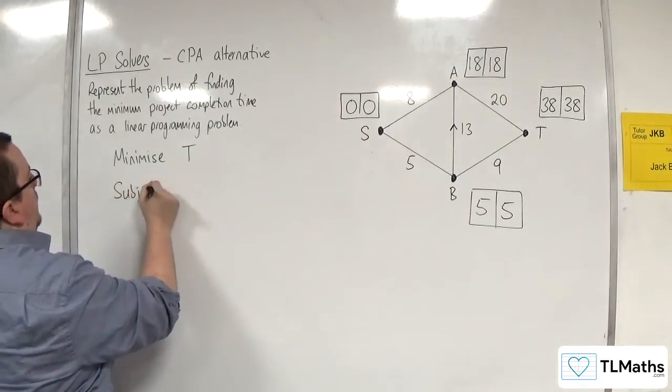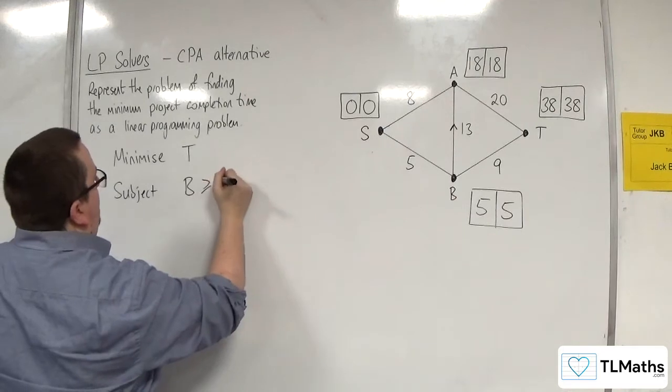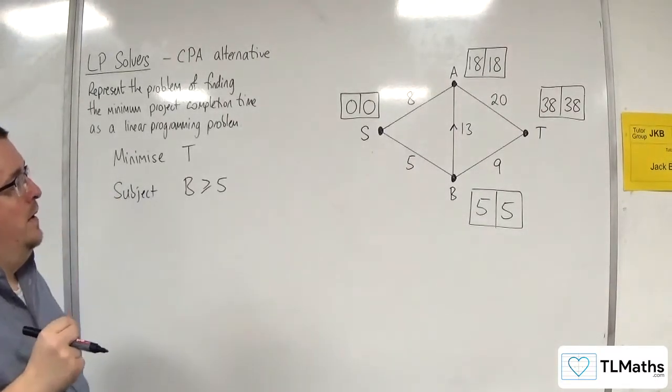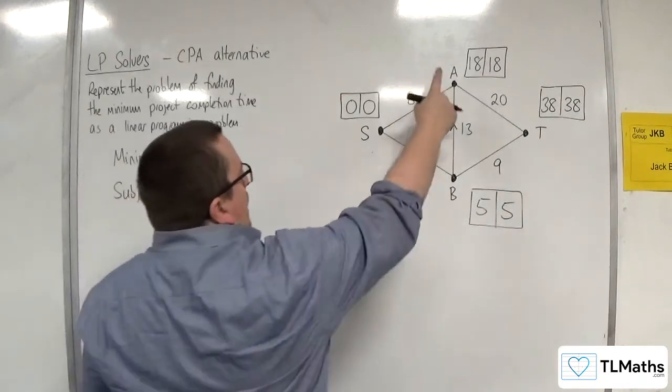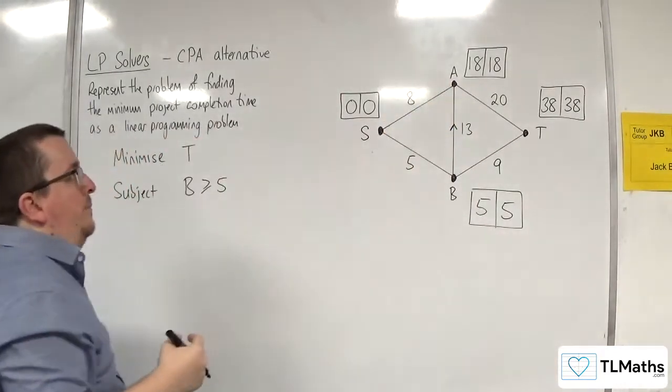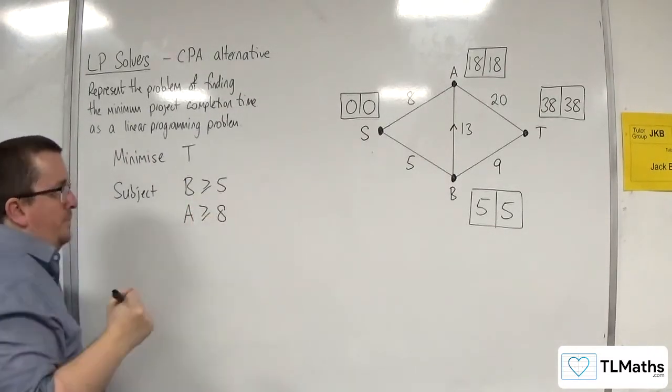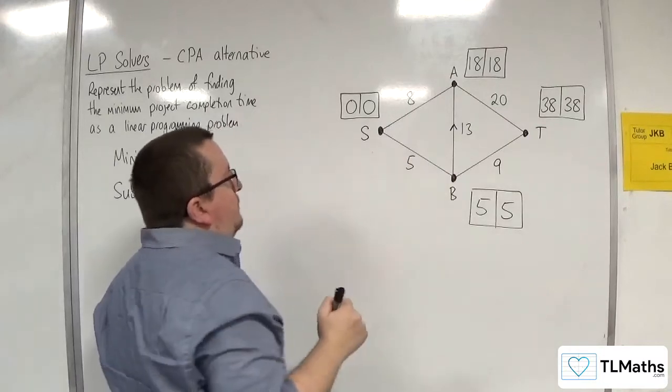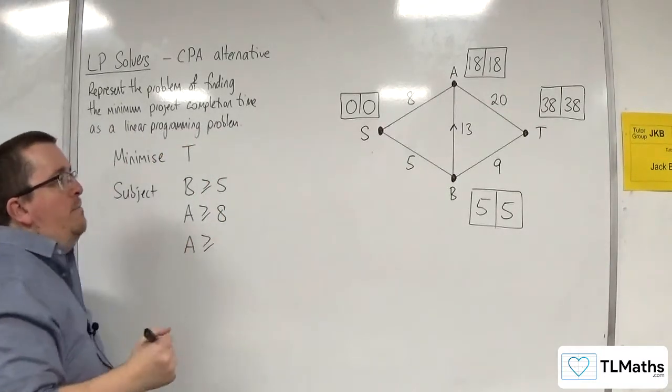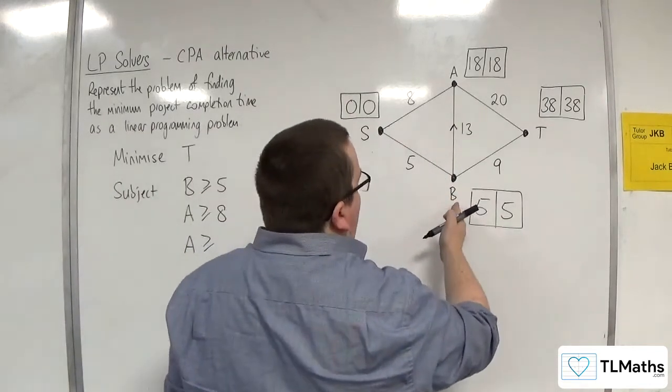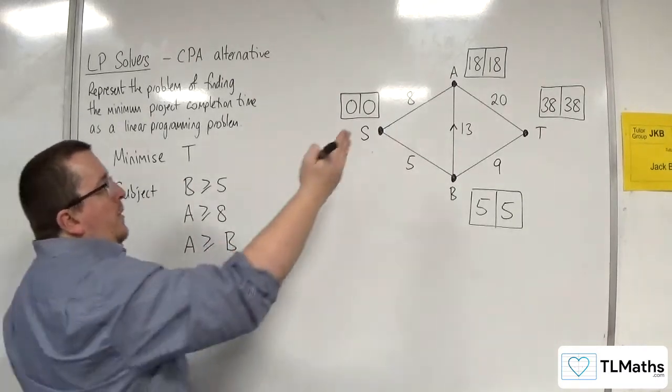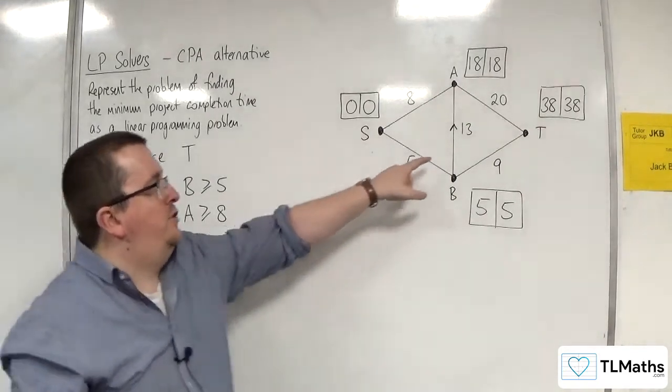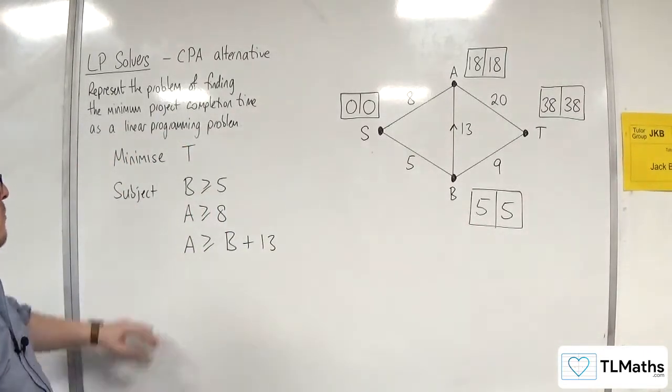So subject to, the value at B has got to be at least 5. We're going to use greater than or equal to inequalities here. Now for A, because we've got this event that takes 8 hours, A needs to be at least 8 in order for that job to be completed. But A also depends on B. So we can also write down that A must be at least whatever the value is at B plus 13. So whatever the value is at B, I need another 13 hours to complete this job in order to get to event A. So I can write down that inequality there.